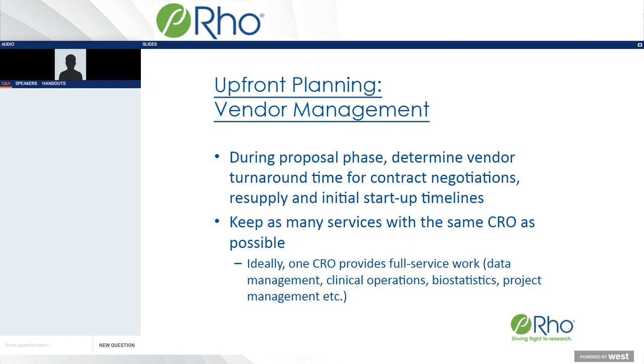And then also, once study begins, what is your resupply timeline? So for these studies that are seeing maybe up to 14 subjects, supplying lab kits in 10 business days, 15 business days, it's really not going to work in order to keep those sites supplied adequately for the trial. So maybe think about, do we oversupply the sites in the beginning so that they have a surplus, and then they can time their resupply requests in a way that they don't run out of supplies? And then what is your contingency plan in case that actually does happen? How will they handle that?